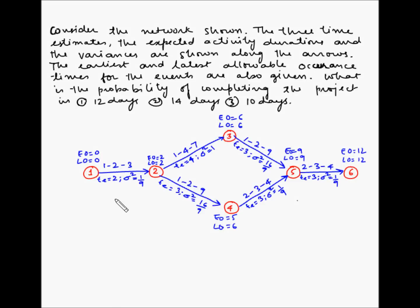Consider the project network shown. In this network, the activities are shown in the form of an arrow and are shown in blue color, while the events are shown with red color in the form of nodes. The 3 time estimates, the expected activity durations, and the variances are shown along the arrows.